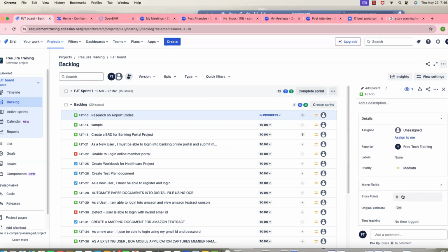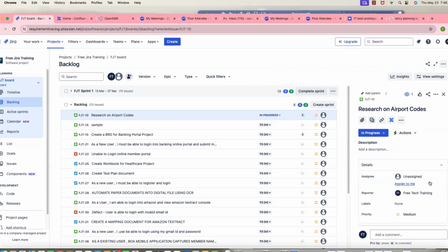Okay. In that Excel sheet, whatever the product owner is filling, only your points will be accumulated. So for this story, it's assigned to both Pradeepa and another developer. Pradeepa's points is 2 pointers. For that developer, it's 3 pointers. So from that 15 points, the 2 points will go, then I'll have 13 more points, and accordingly I can choose my next stories. That will happen in the sprint planning or prioritization call. You got it?